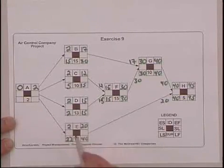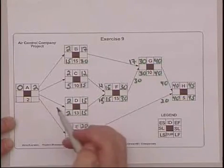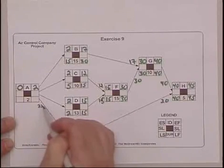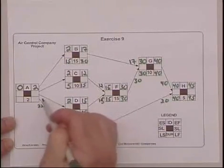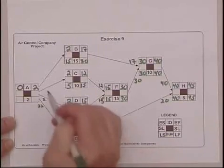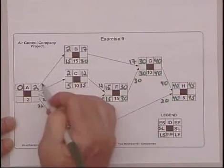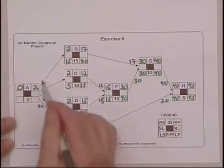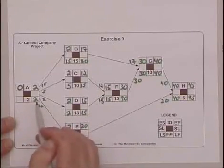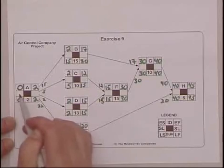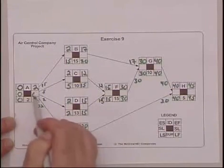And then we've got a bunch of arrows out of activity A. We got a late start of 22, a late start of 2, a late start of 5, and a late start of 15. We choose the smaller number, 2. 2 minus 2 is obviously 0. And when you have that, you know you're in good shape.